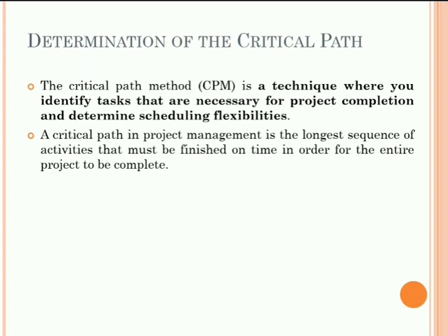The critical tasks here have zero float, which means that their dates are set. The tasks with positive float numbers belong to the non-critical path, meaning they may be delayed without affecting the project completion date. If you are short on time or resources on critical tasks, those may be skipped.